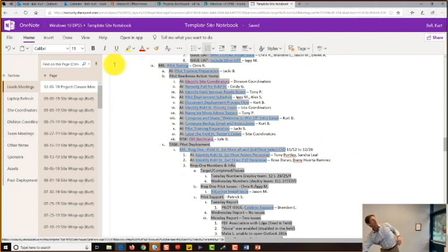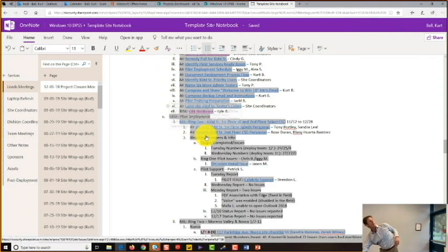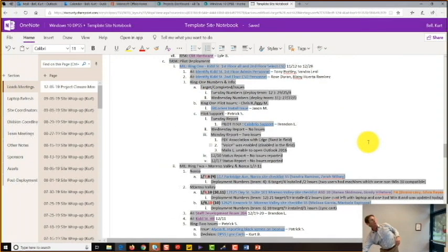There's the pilot testing that occurred. We had to get ready for pilot. There were a lot of items we had to do to get ready. Pilot deployment. Remember, we did pilot in 2 rings. Ring 1 was Kid Street, just across the parking lot, first floor and second floor. And ring 2 was over here, Moreno Valley and Norco. We did that in order to have a diverse set across all 4 divisions with different types of users.